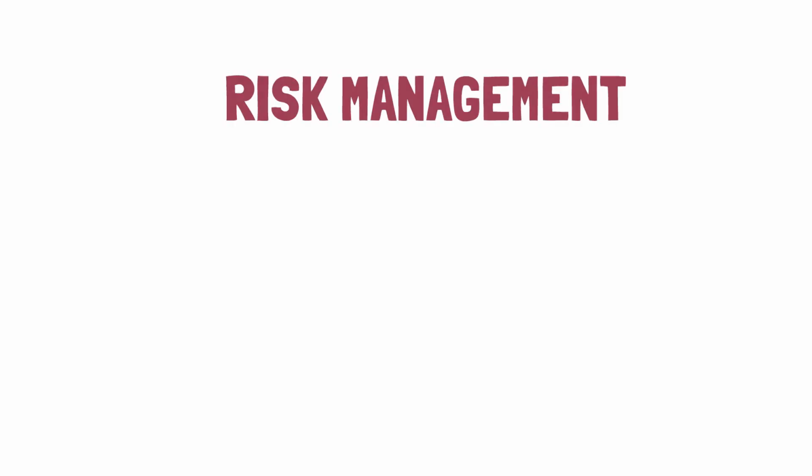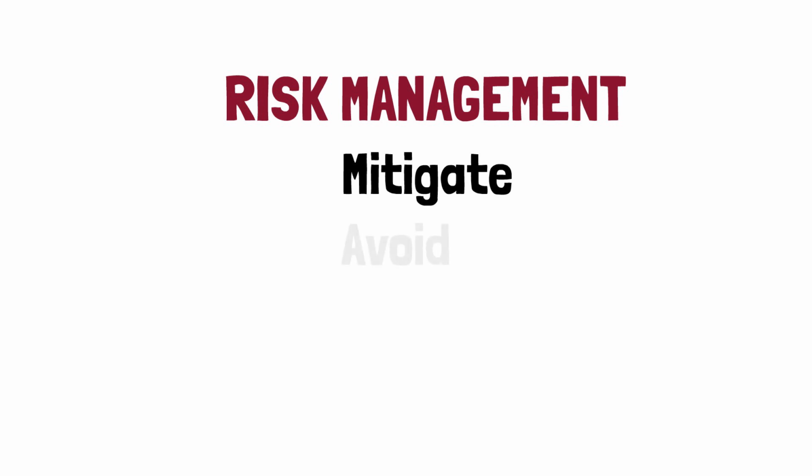So when you identify potential risk, it is also important to identify response options for each risk. And in project management, there are 4 common ways to respond to risks. You can find ways to reduce the chance and effect level of the risk, or you can take steps to avoid the risk entirely. For example, if you've selected a construction company that is prone to having worker strikes or may have a worker strike soon, then perhaps you should choose another company.